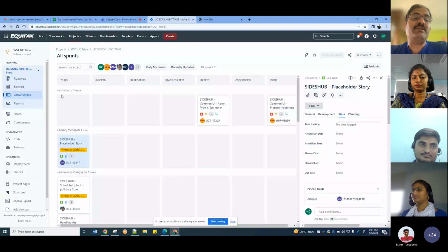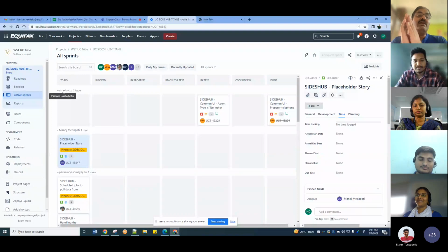So for example, you have a new member in your team. He also needs to start working, right? And let's say you have a senior member and you have a requirement. In order to complete the requirement, the experienced one may take 2 days, whereas the fresher may take 3 days. So what it says is, do not say that it should be done in a particular number of days. You need to define a range. So for example, if it's a one story point, it should be completed within 1 to 2 days. So there is a date range defined for effort.